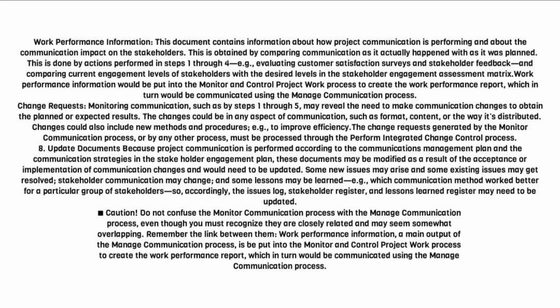8. Update documents. Because project communication is performed according to the Communications Management Plan and the communication strategies in the Stakeholder Engagement Plan, these documents may be modified as a result of the acceptance or implementation of communication changes and would need to be updated.